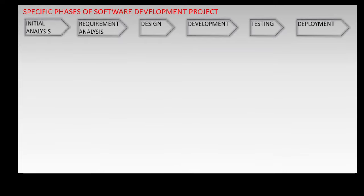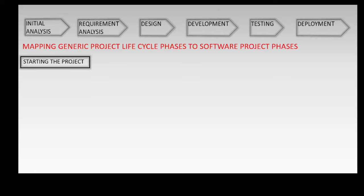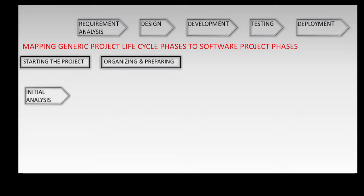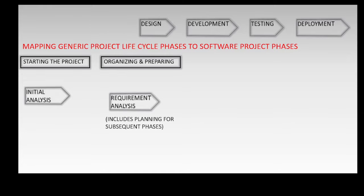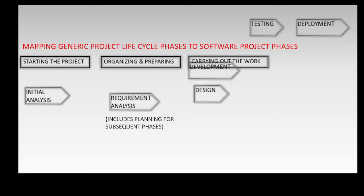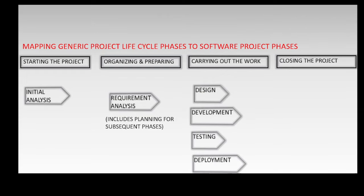For example, the specific phases of a software development project are: initial analysis, requirement analysis, up to deployment. The mapping between the generic project life cycle phases and the specific phases of a software development project is as follows: starting the project is mapped to initial analysis; organizing and preparing is mapped to requirement analysis, which also includes planning for subsequent phases; carrying out the work is mapped to design, development, testing, and deployment; and closing the project is mapped to post-deployment or closing group activities.